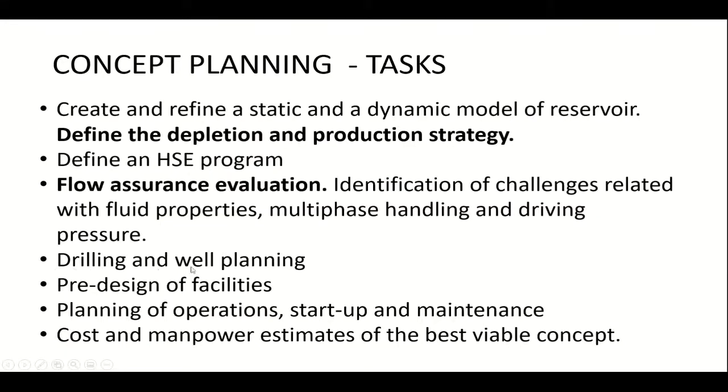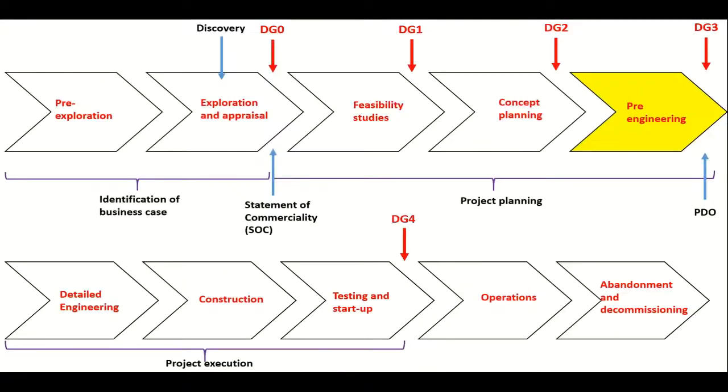I look also into the well planning, as the well schedule is related to how I'm going to produce, which well will produce when. I pre-design the facilities, what kind of capacities, what kind of equipment I need to process these fluids according to this production profile, planning of operations, startup and maintenance, and I perform a more in-depth and less rough, still rough, but with less uncertainty, cost and manpower estimate of the best viable concept.